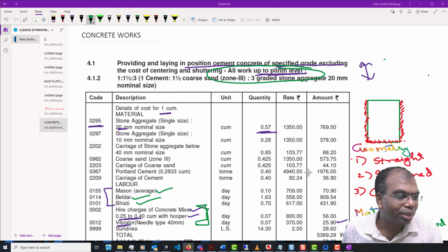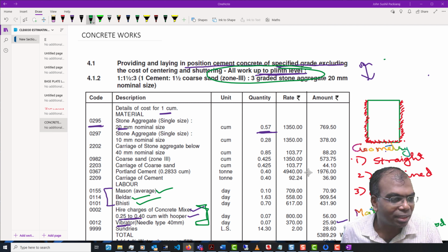It may so happen that the persons who used it have mishandled the shuttering material. And when I get it, it is not going to look good, which means I don't want to use it, because it is not going to suit my requirement, and my employer may reject the material. So in this case, I should preferably get my own.